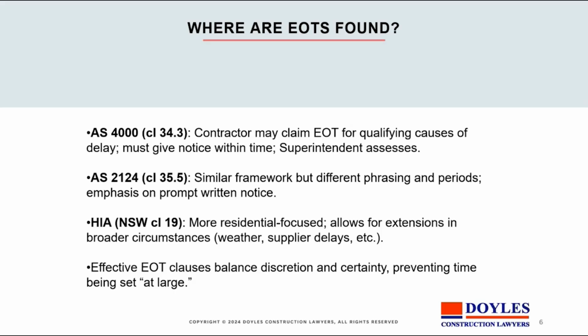If the principal fundamentally prevents the timely completion of the project, the law's natural remedy is to set time at large. Effectively, that means that the contractor might then only have a reasonable time to complete it in, and a much more forgiving timetable.